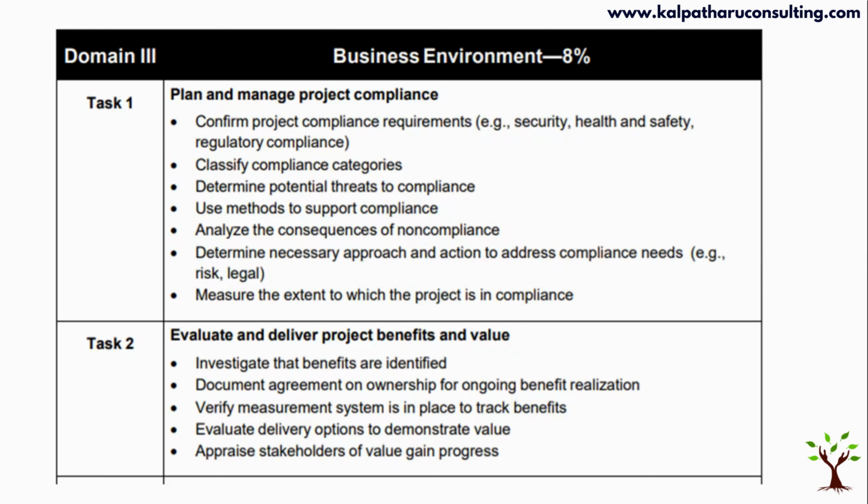So we need to investigate and define the benefit of this project and ensure that a person is assigned who is going to take ownership to monitor the ongoing benefit realization, track the benefits, and also report to the stakeholders on how the value gain is progressing.